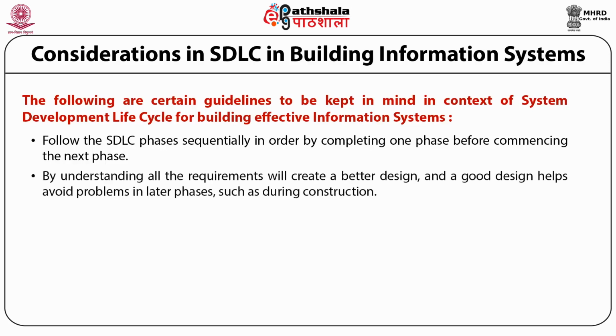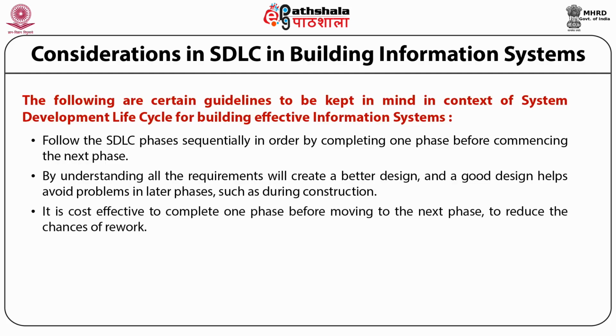Secondly, understanding all the requirements will create a better design. And a good design further helps to avoid problems in later stages, such as during construction. It is very cost effective to complete one phase before moving to the next to reduce the chances of rework.